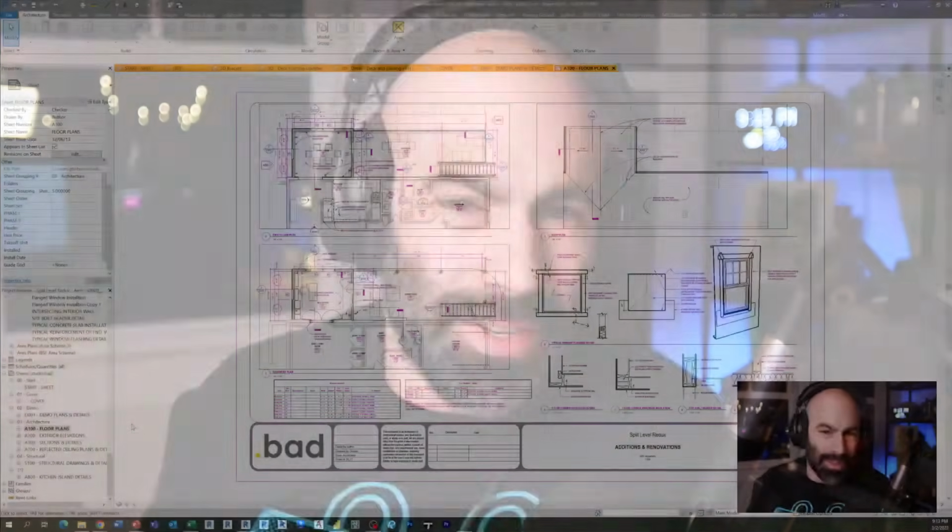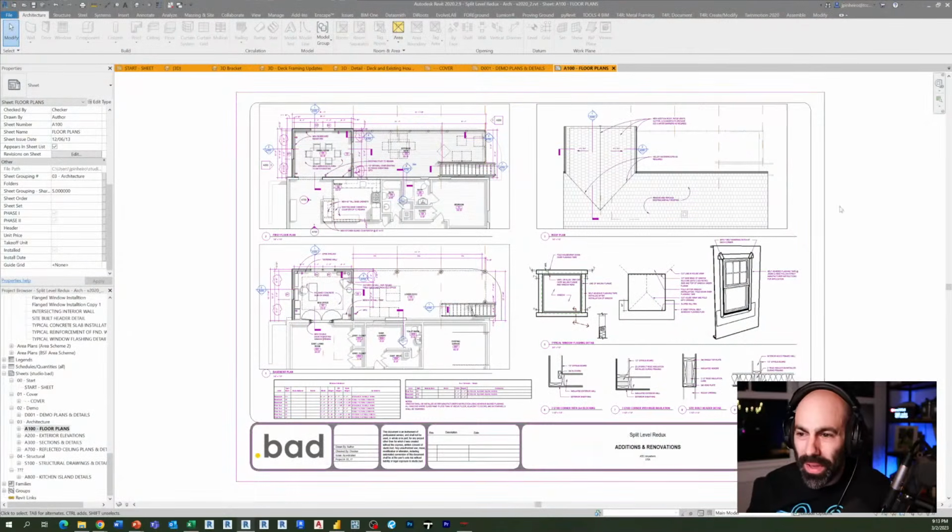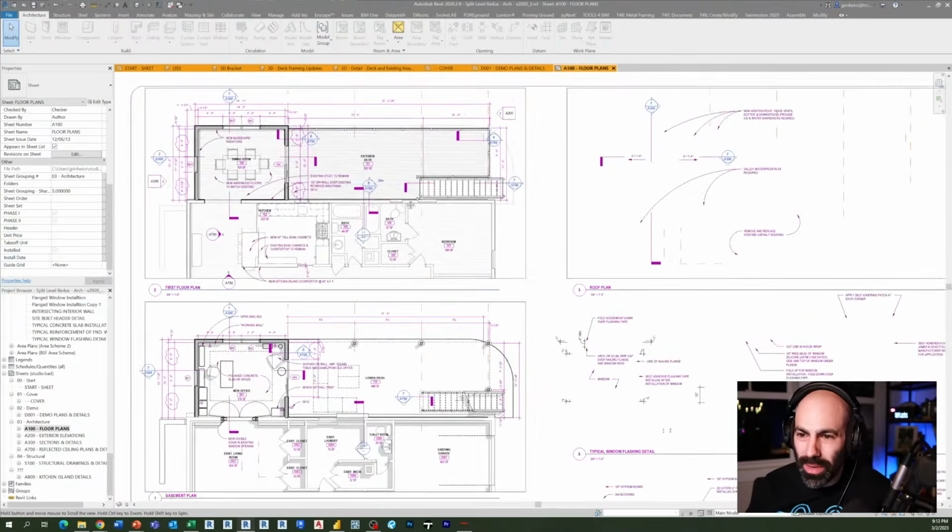I know it makes absolutely no sense when you think about it in the long term, but it was a lesson learned. So thankfully, a very honest subcontractor I reached out to helped me, and I ended up printing a separate set with the shading, shadows, and color all off, which looked like a generic drafted set.